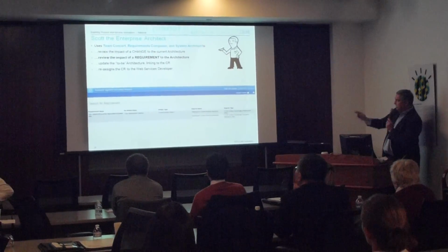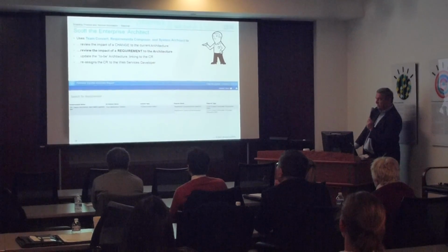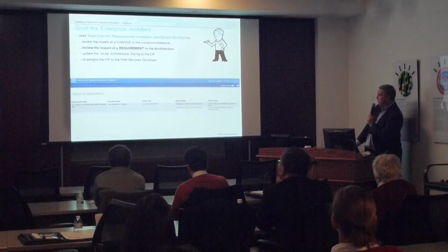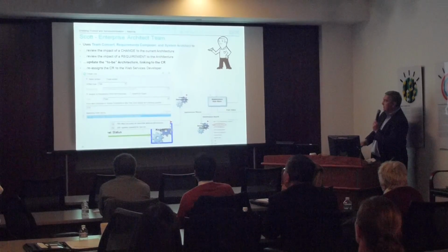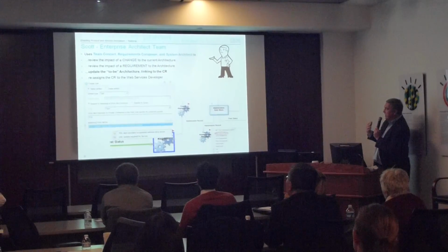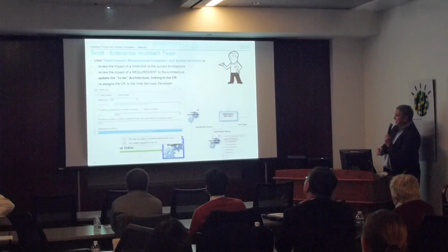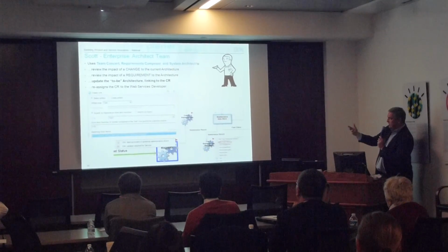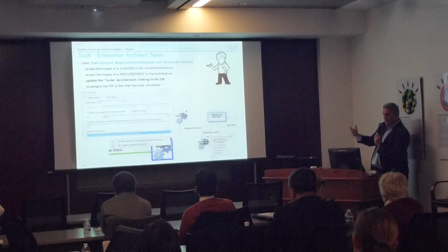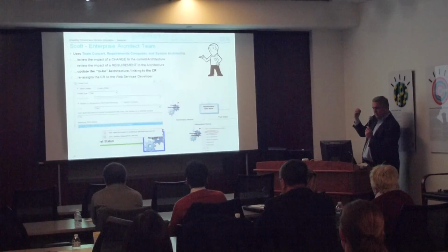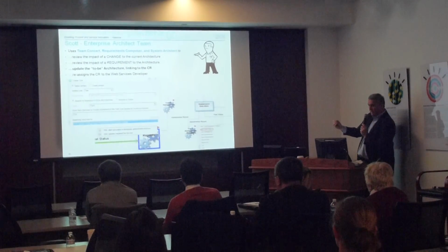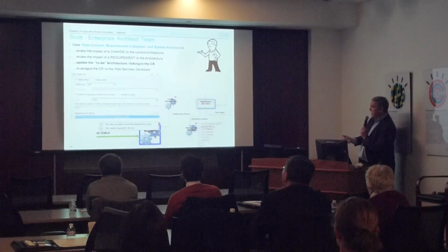I can do a search on requirement 750. What is it linked to? In this case, it's linked to one system function. So that requirement is linked to a system function. So that, this is a new requirement or a modified requirement, I'm going to have to check out that system requirement. But before I do that, in this scenario, we're letting a change request govern any changes made to the architecture and any changes made to the requirements.